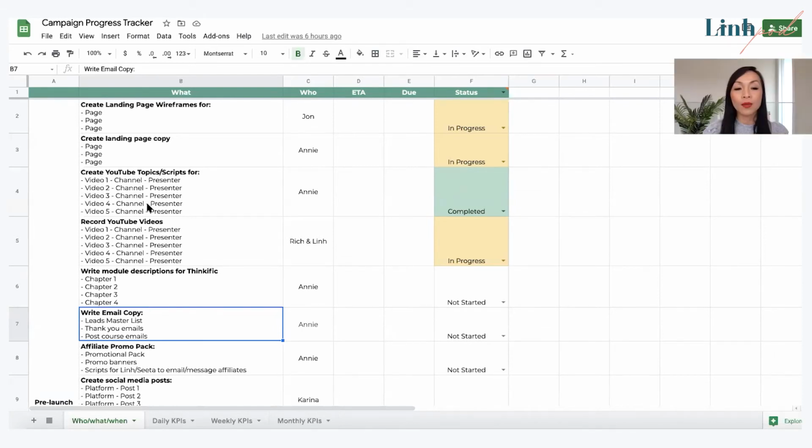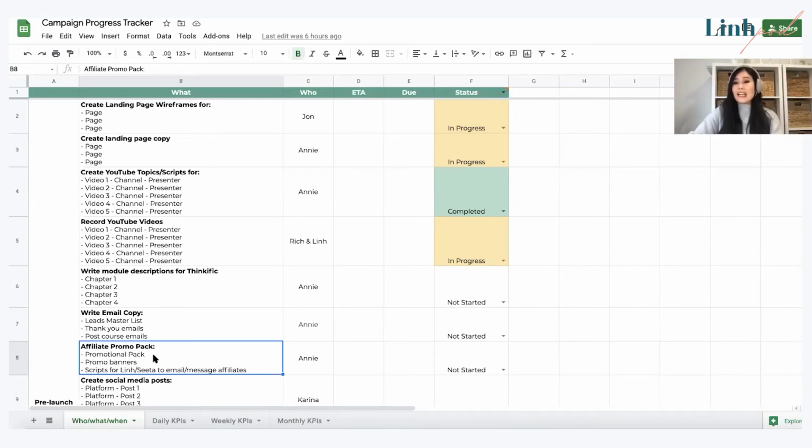So that's right. So when you mentioned, hey guys, do an affiliate promo pack, and it's just one sentence, but really underneath it, it's the banner, the script, all the little items that unless you specify it, you can't really estimate it well. Yeah, exactly. And when I list these things, it might trigger me to remember another thing that would be good for the marketing campaign. So I add it in as well, rather than just saying, everyone, you go launch it, do whatever you want. And then we're all freaking out when we don't make it to the timeline.